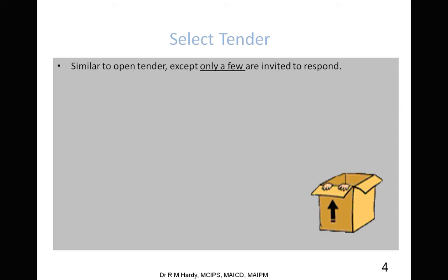Yes, Nathan. Who gets the final say, the client or the architect? Okay, the question was who gets the final say of selecting the tenderer? The client does. Yeah, because at the end of the day, the client will be entering into a contract with the builder. The architect recommends to the client which ones the architect thinks should get the job. But ultimately, it's the client's choice, and the client, of course, has to be then responsible for that choice as well.